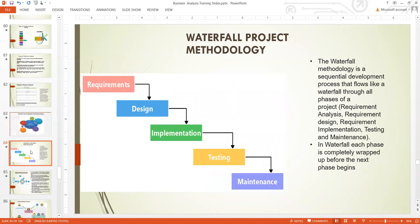The Waterfall methodology is a sequential development process that flows like water through all phases of a project — from requirement analysis to design, to implementation, to testing and maintenance. In Waterfall, each phase is completely wrapped up before the next phase begins. The downfall of Waterfall is that it doesn't give the stakeholders an opportunity to understand the outcome of the project until the project is actually finished.